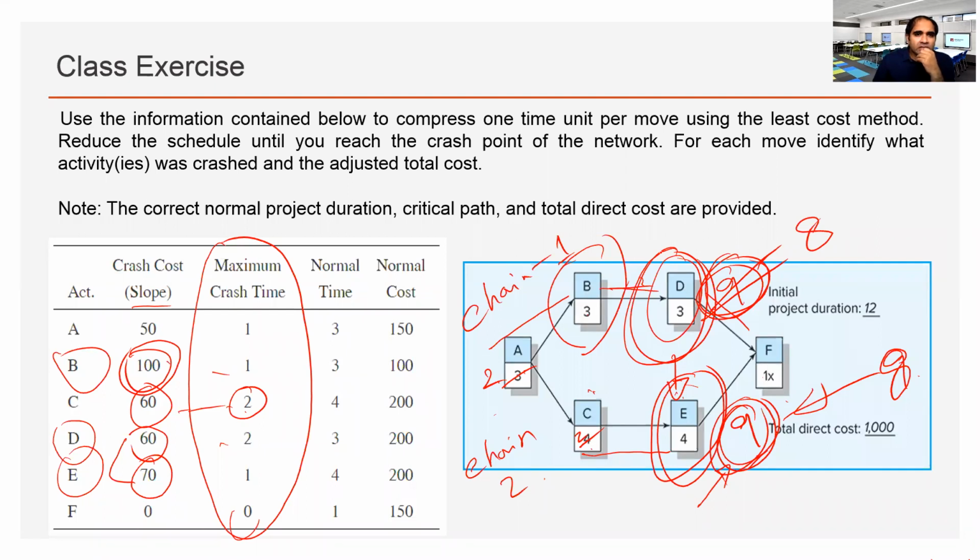The goal is to minimize the project duration with the cost involved for each unit of reduction in the total duration, finding the lowest possible duration and also the optimum point. Optimum point is the lowest total cost. The lowest duration will not be the lowest cost. The lowest duration of the project will be at a higher cost than the optimum point.